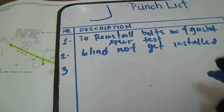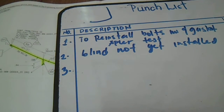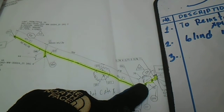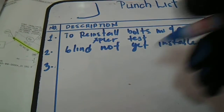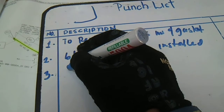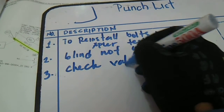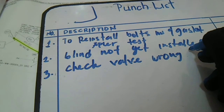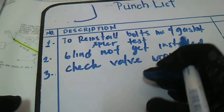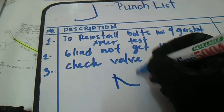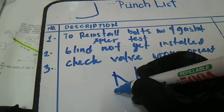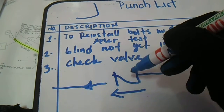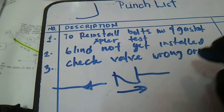Number three: you have a comment to check valve wrong orientation. This means the check valve flow direction — the flow is like this on the line — but they installed it in the wrong direction, so this is not good.